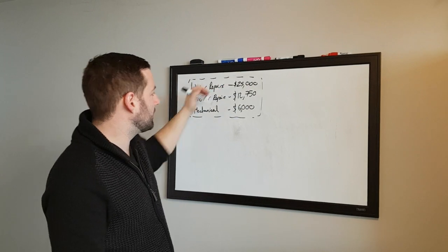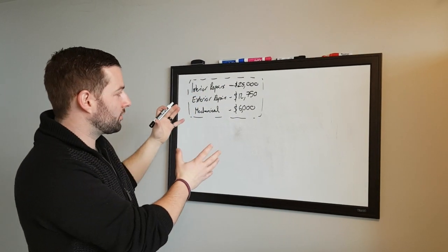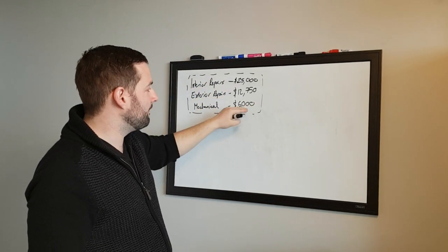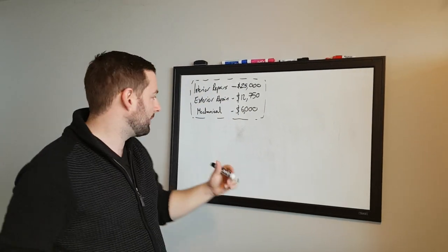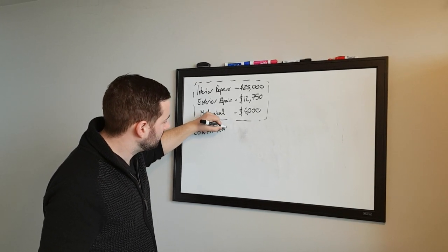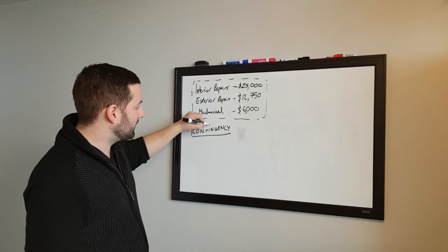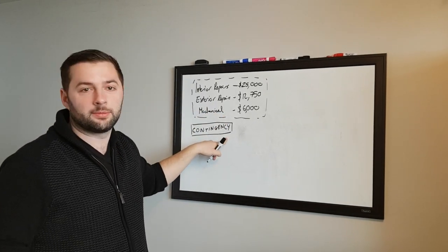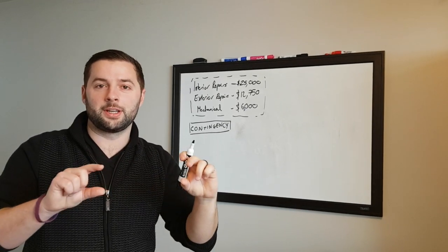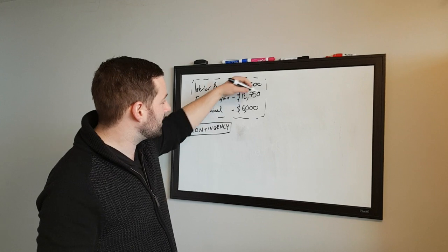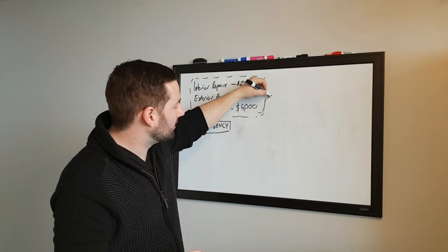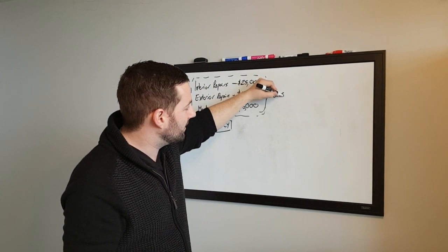So this in our budget is broken out finer, but just to showcase to you guys, what we always account for, after this is all said and done, one of the most important line items is called your contingency. This right here is your, oh crap, I forgot this line item and I didn't account for it, but thank God I have a little bit of cushion in my budget. Okay, so our contingency is typically our budgeted or our estimated values here times 15%.